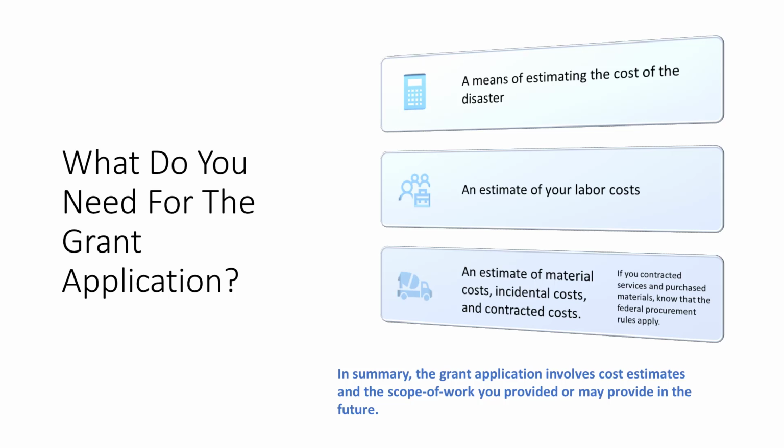You'll need to estimate material costs, incidental costs, contracted costs, and if you contracted services and purchased materials, know that the federal procurement rules already apply. We'll talk a lot about this in this series. That's your biggest trap right there.